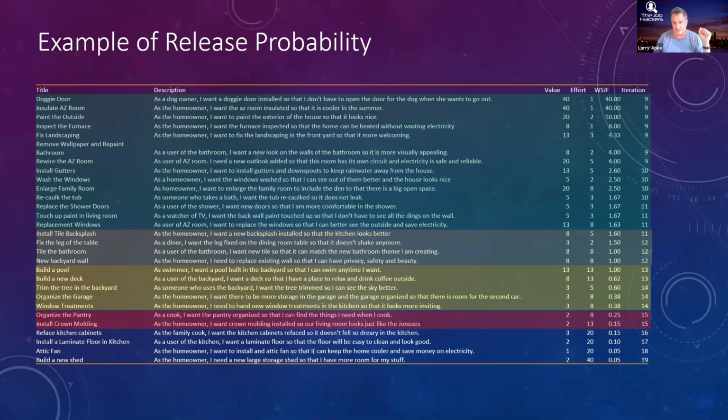There are no absolutes. It's not going to happen that way. You can live in that world, but it's not going to be too good for you because the fantasy world is not the best place to live. What I can do is say that these things in dark green, we're going to give a high probability to. Let's say 87% chance. But that's assuming we don't change anything at all. We don't change the team, right? We don't break up the team. We don't change the sequence of the work. We don't change the work itself. We don't add things, et cetera. This is what the future looks like.